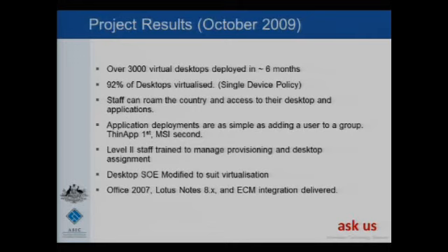Okay. So we did the packaging. We do a ThinApp first policy. ThinApp wasn't originally part of the solution that we were looking at, but as soon as we identified no packaging processes in place, it was the best tool for the job because we could easily get people to learn how to ThinApp packages and then get them out to the desktops. Teaching people to do traditional InstallShield is quite a skill. So the ThinApp first policy worked for us. Things that we couldn't ThinApp or weren't able to be app virtualized, we then used the traditional InstallShield.